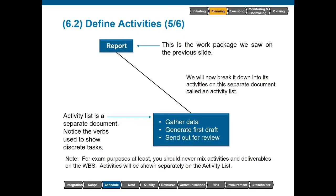Now for exam purposes — and this may be different from what you do in your organization — you do not put any activities onto the WBS. Activities will always go onto the activities list. The WBS will remain strictly deliverable-oriented. The activities will be fully documented, but never on the WBS.